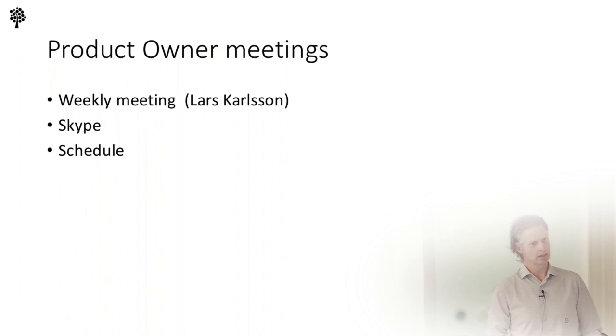There will be a weekly meeting, like a sprint review. And I usually put these on Fridays. So on Fridays, I will walk through each team, and it will be an hour or so. The first two sprints will have like an hour and a half or something like that, because we have a lot of things to talk about, and you have a lot of questions regarding Scrum itself. So if that is okay, I will have these sprint reviews on Fridays.